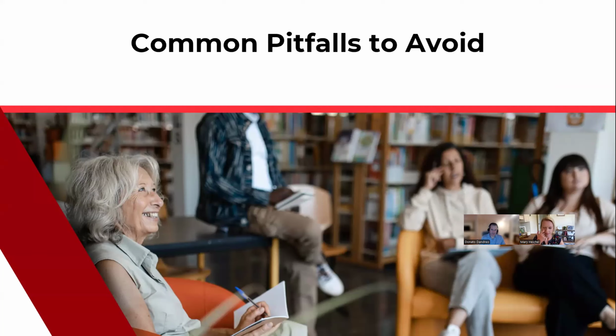So start with your own information gathering based on something like we've been talking about today. Interview multiple companies that you think could possibly be a good fit, maybe through a Google search, or maybe some of those websites you found that you really like. They have the designers linked at the bottom, and you contact those companies, and then interview them, getting their feedback. You also probably, if you like them, get some people on the list that you'll actually invite to the RFP by the end of it, and then work through the process of having a very clearly defined RFP.